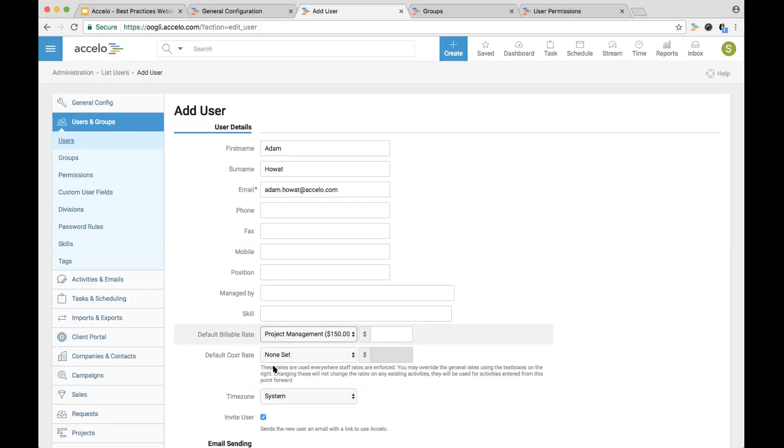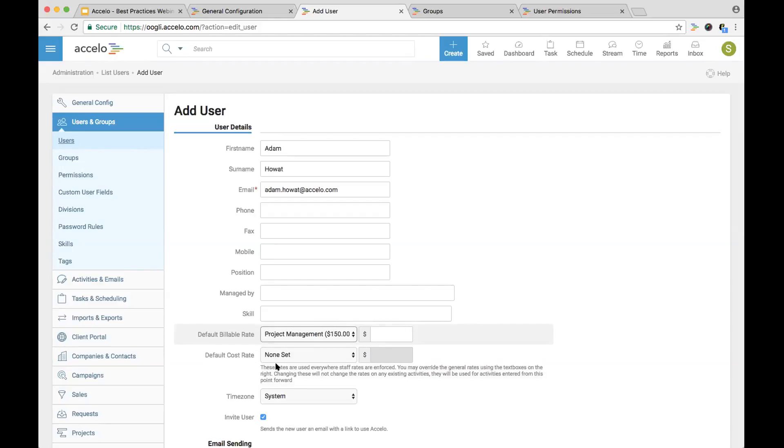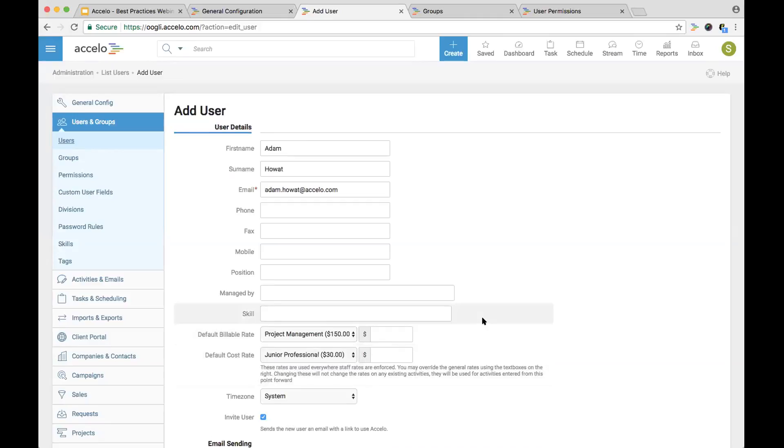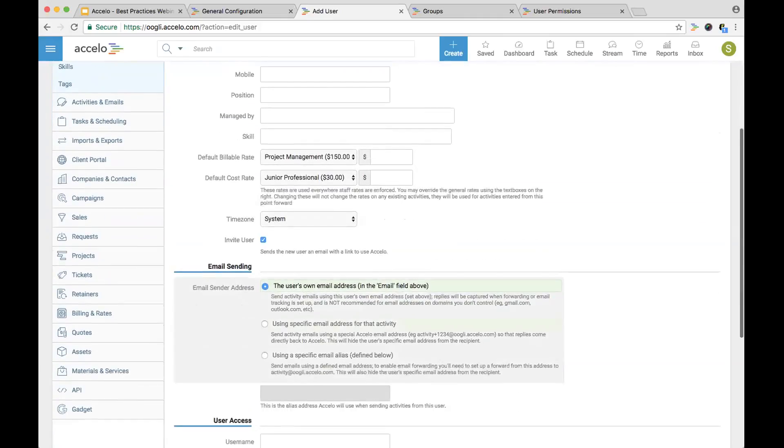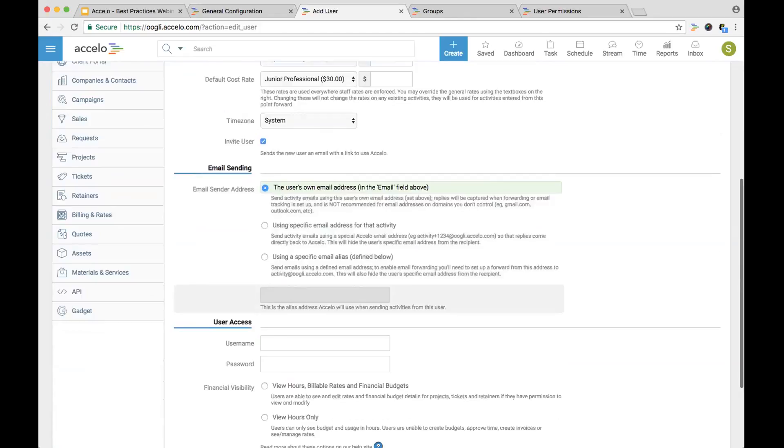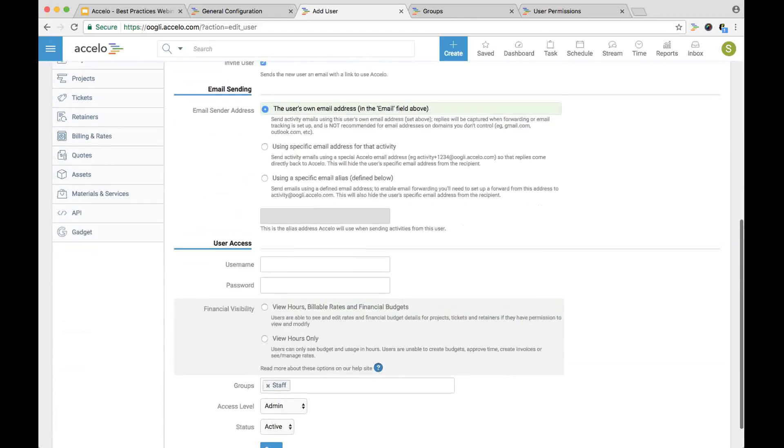Adam manages our implementation projects. We're considering a project manager at $150 an hour as a billable rate. This can be overridden from any one of these objects. You can also have a default cost rate. If you're thinking of what is Adam's cost to our company, that includes his salary and his overhead. Let's go ahead and say he's a junior professional joining our team recently.